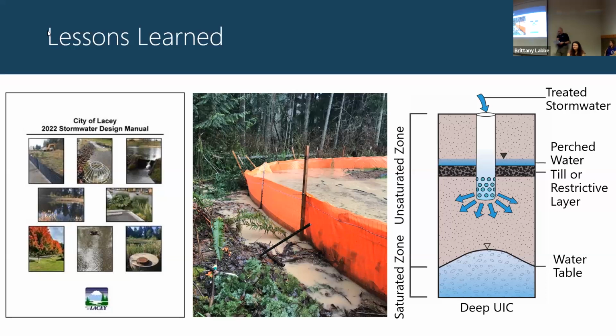Lessons learned for the wet season SWIP, it's the result of lessons learned in the past. We've just implemented it with this new manual. So this is the first winter, so I can't really tell you how well it's working yet, because we're just getting going on implementing it. But the lesson we learned in the past is that a construction SWIP prepared for summer work might not be adequate when you get that deluge in the winter time.